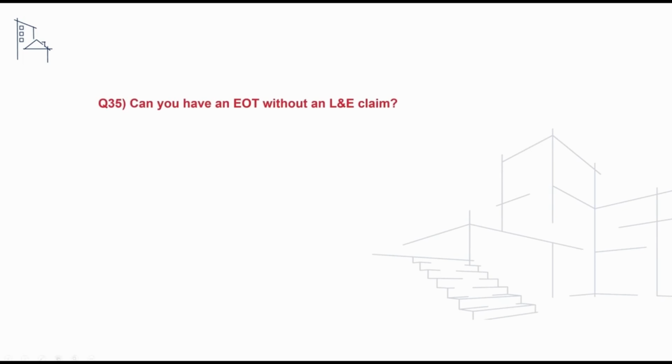The next question we'll take a look at asks, can you have an extension of time without a loss and expense claim? An extension of time does not automatically mean entitlement to an L&E claim, and therefore you can have an EOT in isolation.